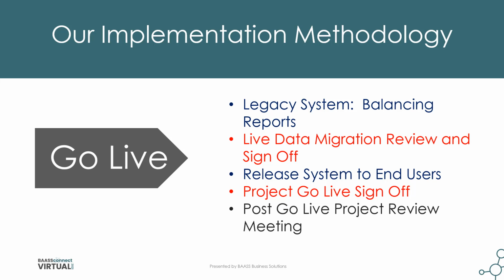Again, we ask at this time that the client is responsible for user setup. This would have been included in your training and should be something that is worked towards prior to go live, so that at the time of go live, we can simply just release to end users and there's no additional configuration. At this time, we will have our project go live status update, which will also include a sign off. We will then host a post-go live project review meeting with all team members shortly after we've gone live, but when the noise settles down.